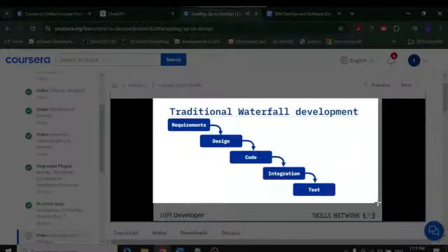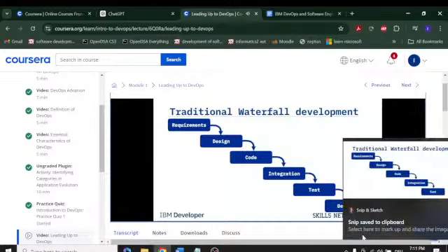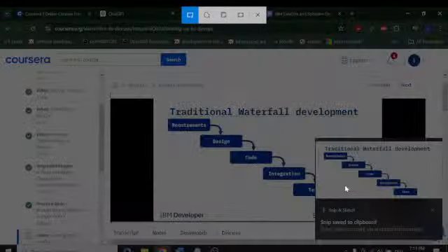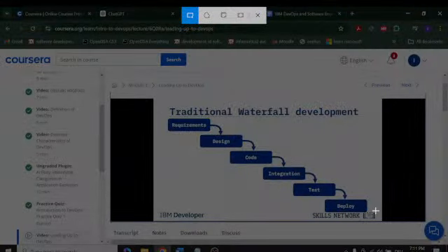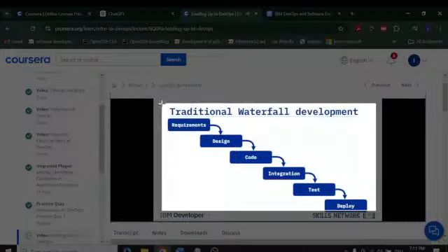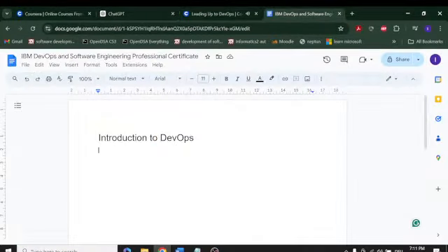It's called waterfall because if there's a problem, it's very hard to go back, like trying to swim up a waterfall. You have to go all the way back to the design phase. In fact, because we treat software development like civil engineering projects, sometimes those designs have moved on, right? The architects moved on, the designers moved on to the next project, and you've got to go find them and get them to change the design. Then you get the developers to change the code in hopes that it integrates this time.